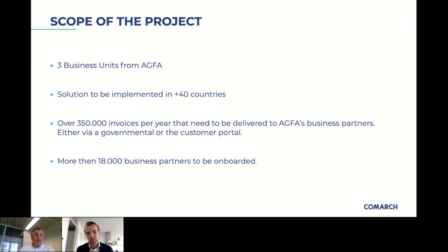The lesson we learned is clearly that we need to inform our customers upfront, to make sure that the majority of customers are onboarded prior to the real go live, and then you have a smoother go live rather than going live and onboarding at the same time, because then you end up in a kind of vicious circle, and it's very difficult to break it. And then, like I mentioned, the COVID crisis was not helping, because a lot of customers have other priorities than clicking on a link to get access to a portal.